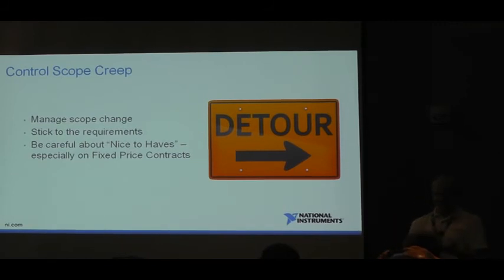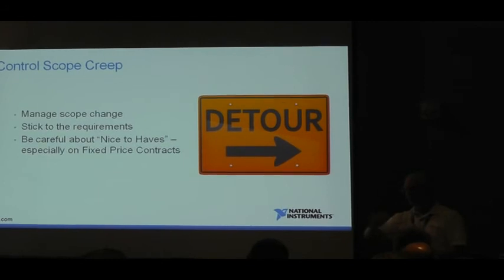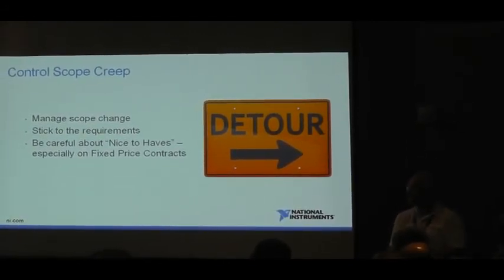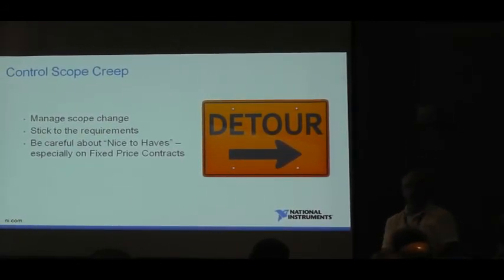We've had several contracts lately where it says in bold, all caps, we're not authorized to invoice the client unless we have approval from the purchasing agent. So like I said, the engineer, the manager could say, oh yes, I approve, we've got funding. But unless the purchasing agent approves it and authorizes the additional money, then it's not approved.